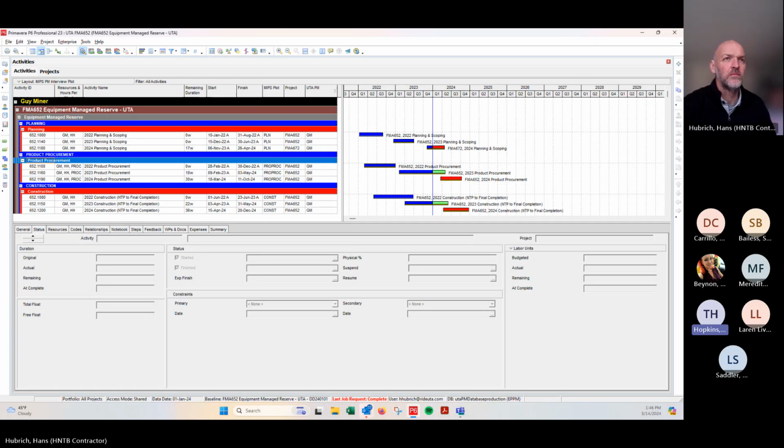So it's really the same. It's accomplishing the same thing, as Hans says. The data date is really just the time that you're looking at the schedule and saying, looking at these activities, where does the project exist relative to this date? And so if we're going to call it Q3 2023 or Q4 2023, that's fine.